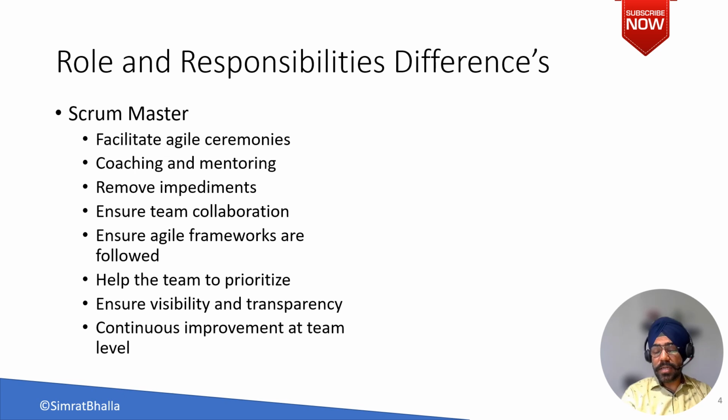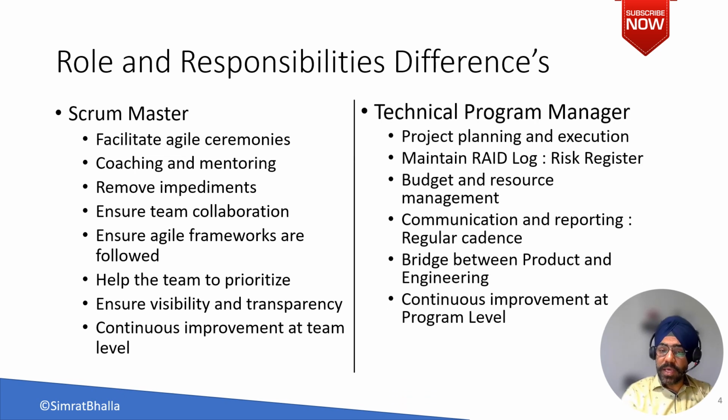Now let's understand how it is different from a TPM role. As a TPM, as I said earlier, the TPM is a more wider role. So you have to create a plan which includes your resources. When I say resources, it includes your people and non-people. TPM maintains a RAID log. RAID has a full form. R stands for risks, A stands for assumptions, I stands for issues, and D stands for dependencies.